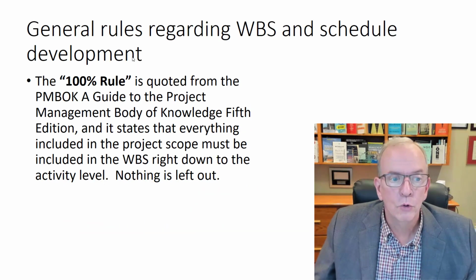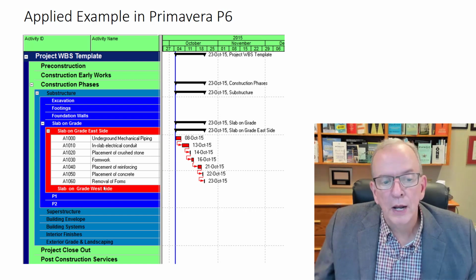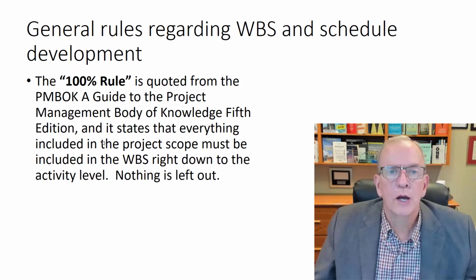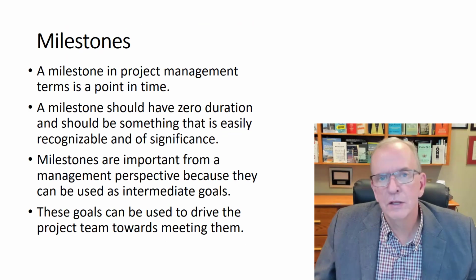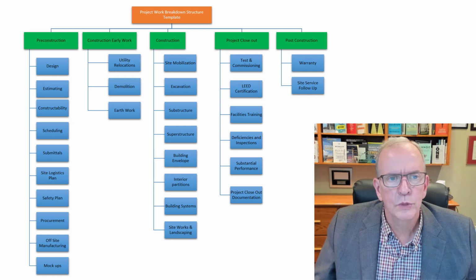Now, not only can activities be housed, you're going to have your milestones within there. For example, I could go back here to removal of forms. If I had the completion of this area of work, I might want to have a milestone underneath that, and I could have a milestone that I could be tracking on my project as well. It wouldn't be part of the hierarchical list of the work breakdown structure, but it's incorporated and housed under different levels. I'll save milestones for another day because that's another whole discussion unto itself.